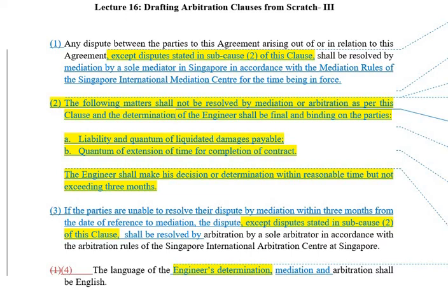Whether the agreement provides for resolution of an entire class of disputes through one forum rather than splitting of class of disputes? Yes. So it is very restrictive in terms of expert determination. Liability and quantum of liquidated damages payable is covered by the expert determination, and the quantum of extension of time for completion of contract.